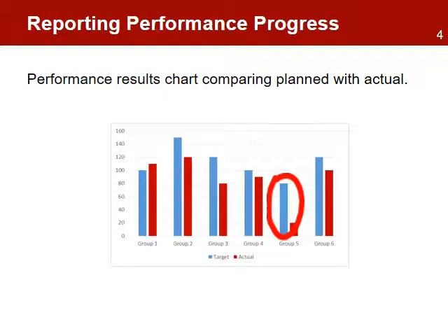Performance reports are used mainly to inform stakeholders about the accomplishments of the project. The information collected in the report is focused on comparing expected results to the results actually achieved to date. If results achieved fall short of what was expected, this signals possible problems that need to be discussed and resolved. The performance reports include charts to help visualize the data from the indicators in a format that facilitates identification of problems.